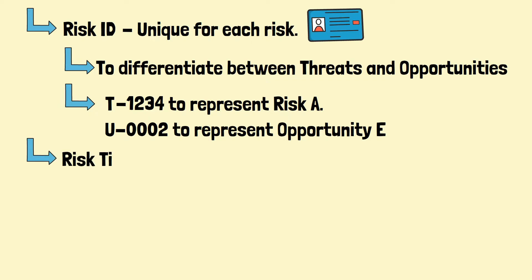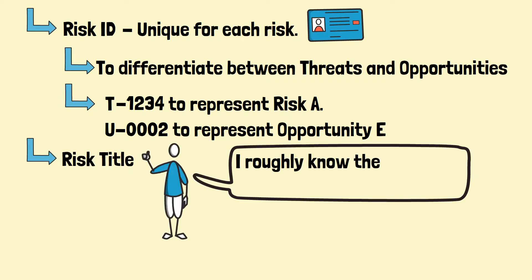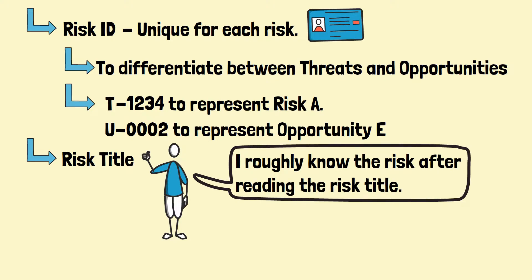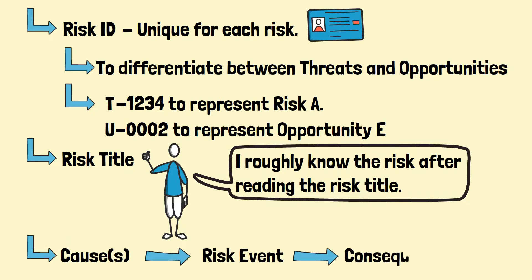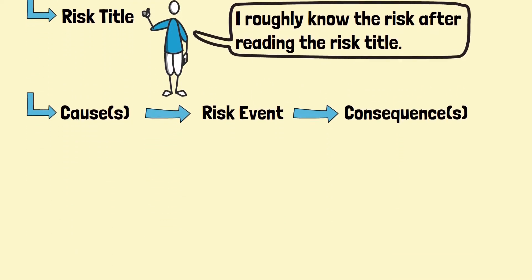Next, the risk needs a risk title. The risk title should be precise, and everyone can have a rough idea of the risk after reading it. The causes, event, and consequences information is the next critical information to be captured in the risk register.